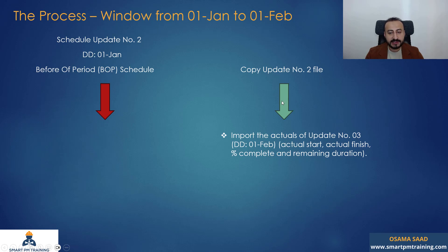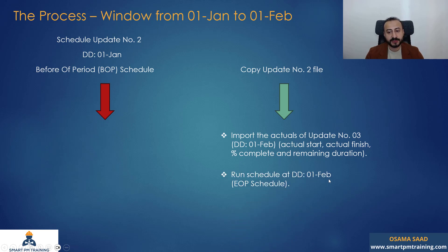After I import the actuals, my data date is still the same — 1st of January. So after that, I will run the schedule at data date 1st of February, after I took all actuals and imported them from update number three. I will run the schedule at 1st of February and this will be my end of period.